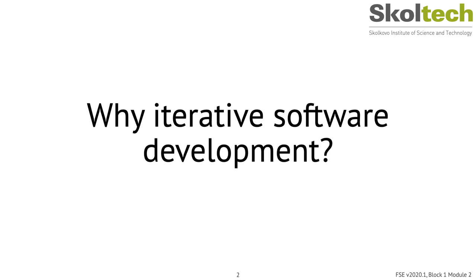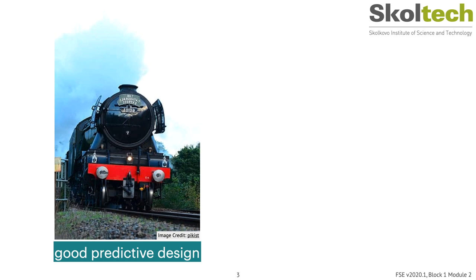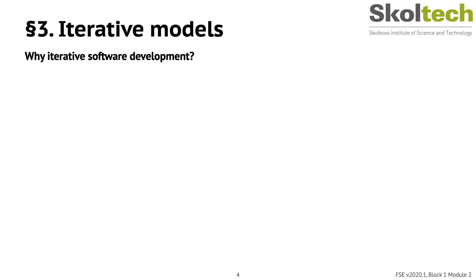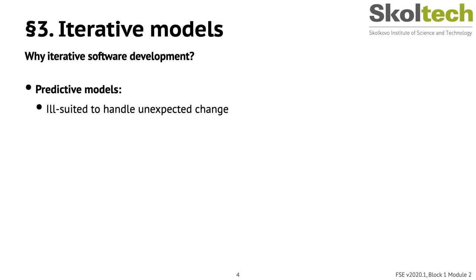Predictive software development has big advantages: it's predictable, encourages a lot of upfront design, and gives a certain inevitability to a project. Unfortunately, this inevitability can lead to either success or failure. If the design is correct and everything stays on track, the project is like a luxury train crawling majestically into Grand Central Station. However, if something goes wrong, the project is more like a train engulfed in flames speeding toward a dynamited bridge. Predictive models are inherently ill-suited to handle unexpected change — they can deal with small changes but don't handle big changes or fuzzy requirements well.